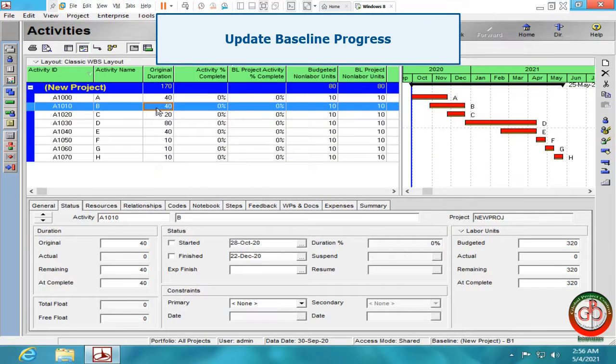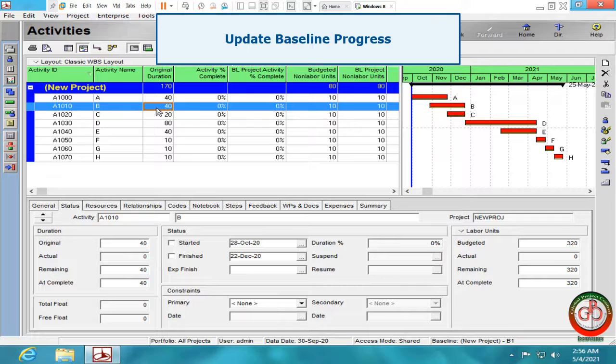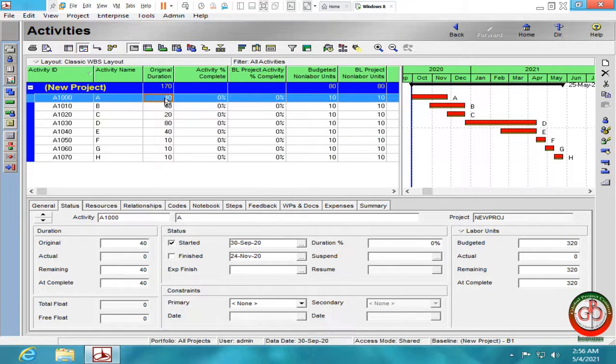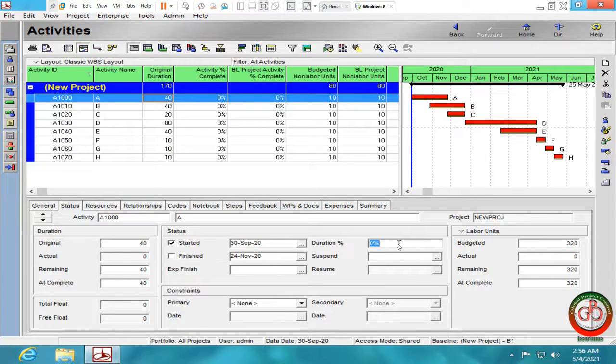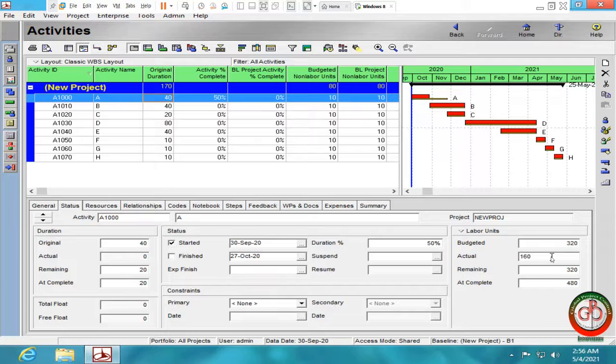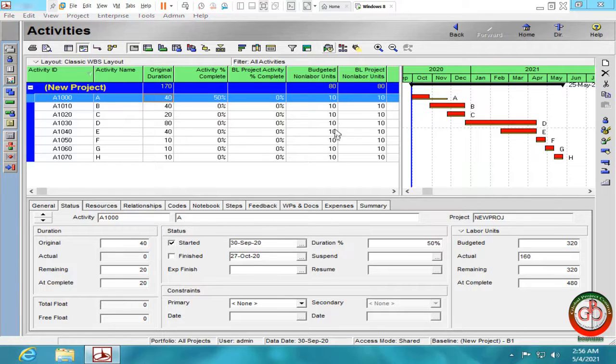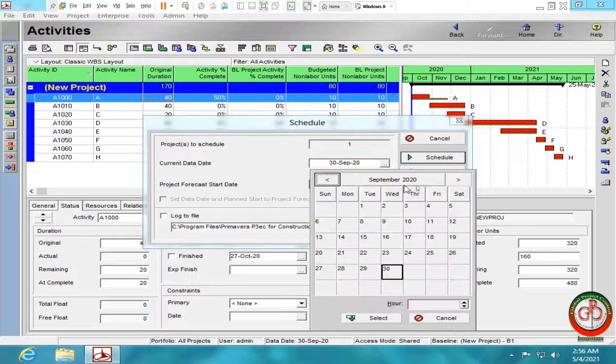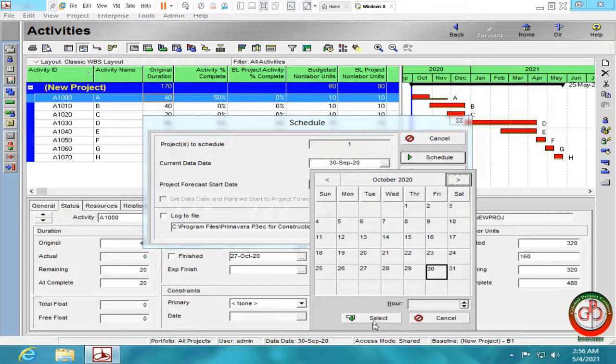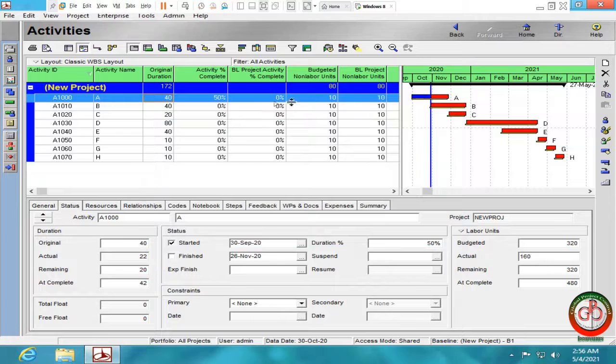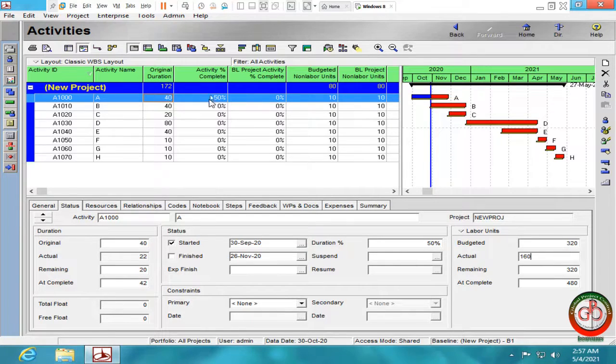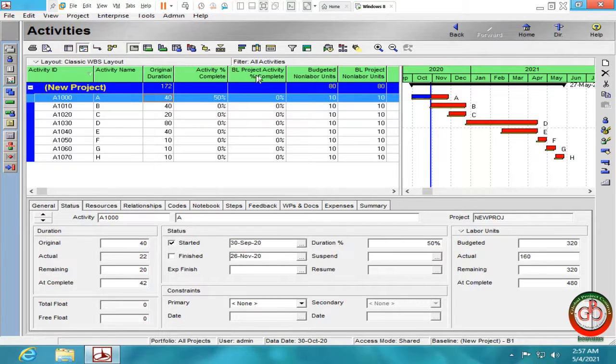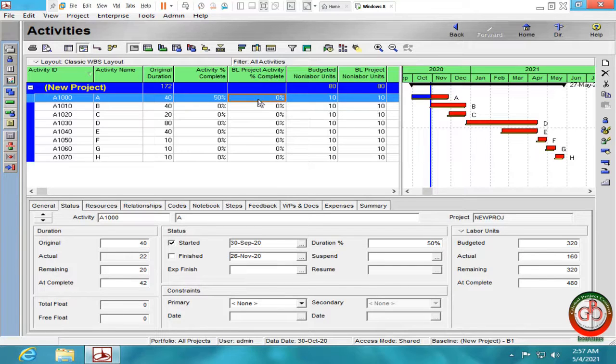Sometimes, after you updated the project, you face some matter with your baseline, and you need to update your baseline too. For instance, let me update activity A for 50% and add the budget for 50%. Then I schedule it to a month ahead. And as you see, I record 50% of activity percent complete in this activity. But my baseline activity percent complete is zero.